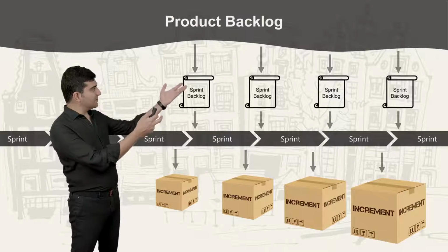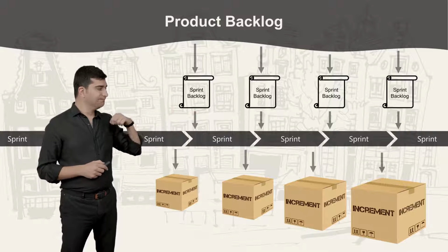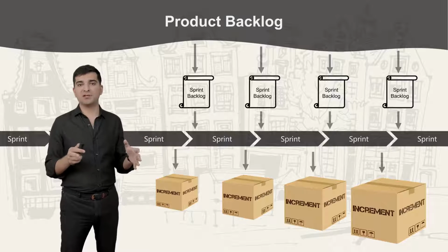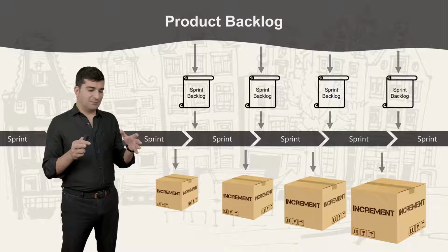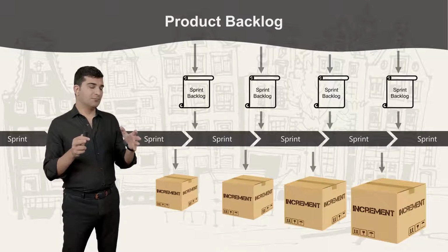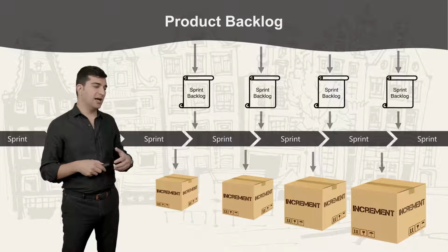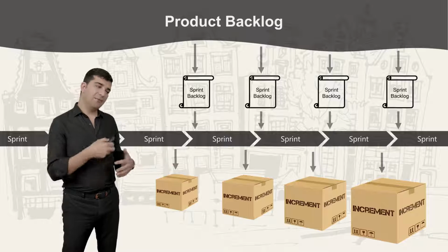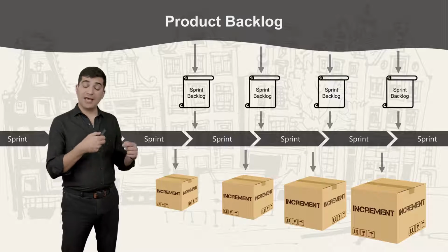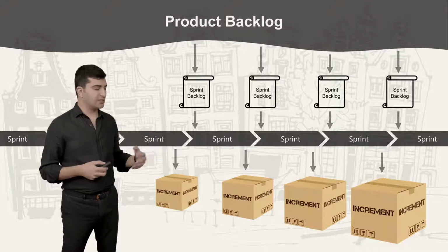And this is how Scrum works. We have a number of sprints. Each sprint is a time-boxed partition where we develop. And by that it means that it has a fixed duration. For example, it's 2 weeks or 3 weeks or 1 month. You set the duration in the beginning of the project and you don't change it all the time. Maybe every once in a while based on what you learn from the project. And it shouldn't be longer than 1 month. So let's say every 2 weeks, for example.